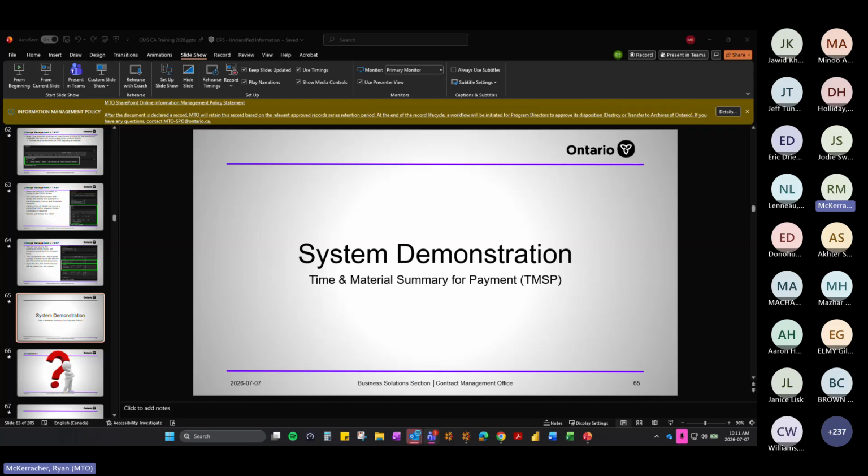If we agreed upon doing work on a T&M basis, should the CA issue the change order or wait for the DWRs and then issue the change order? No, if you recognize a change to the scope of work and you agree that it's a change to the scope of work, you should issue a time material change order and then start taking DWRs against that time material change order. Okay, good questions.